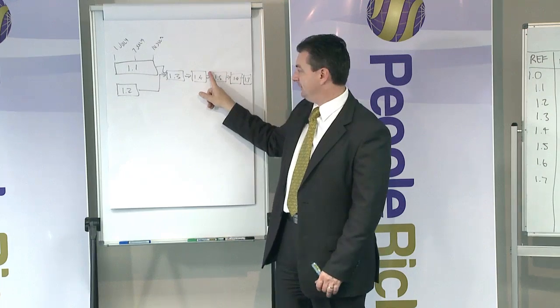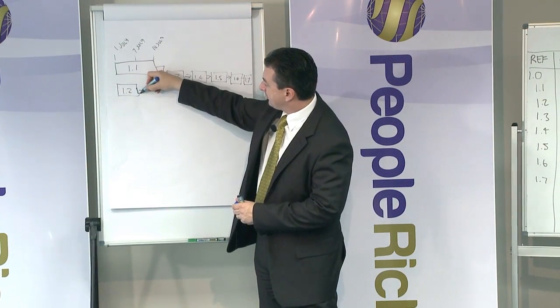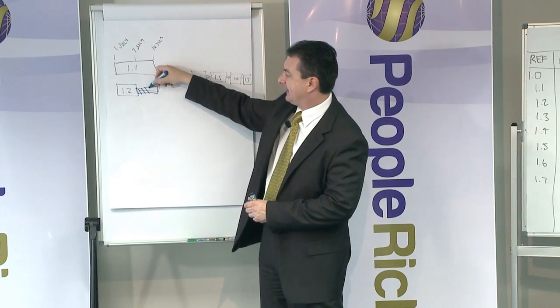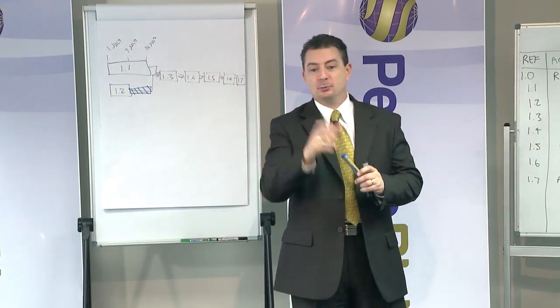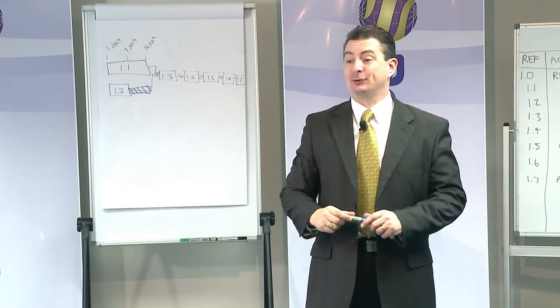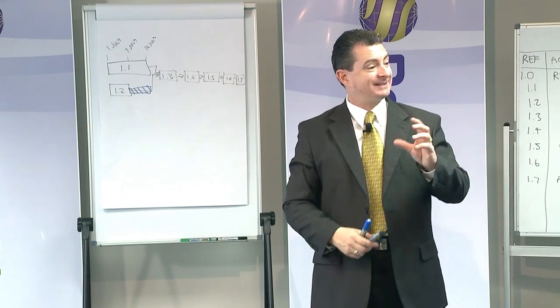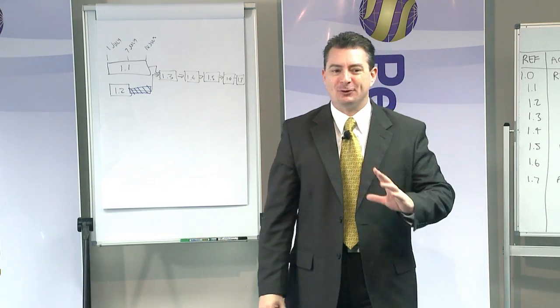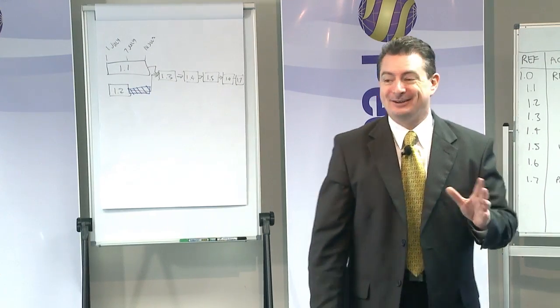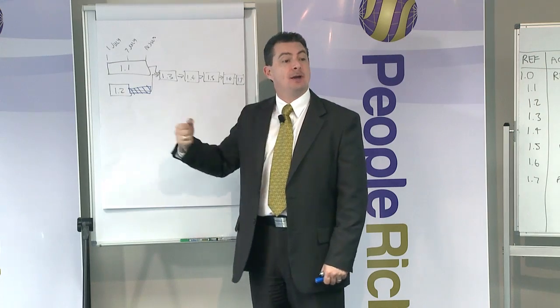Right, so we call that having a finish to start relationship. Finish to start relationship. But this one here had a kind of gap. Does anyone know the name of the gap? Something that we can move. Starts with F. Float. Who's heard that term before? Float. Excellent. The older term used to call it slack, but I think you're not allowed to walk around your organisation now saying who's slacking off. Right? Different thing. So this float means that there's some time behind it.